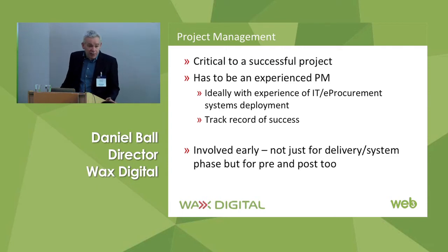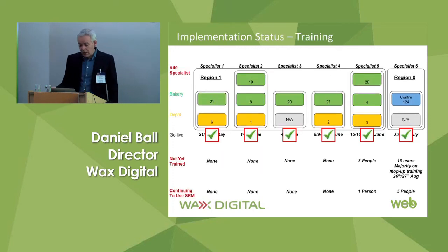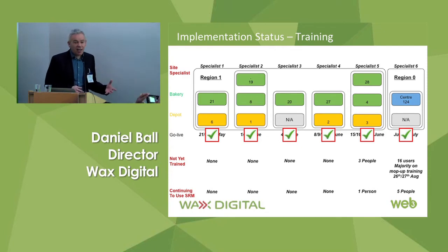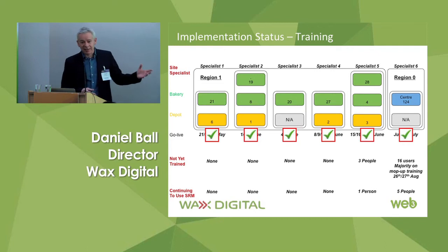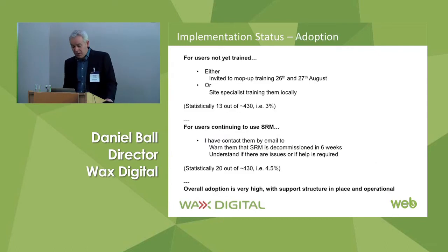Ideally with experience of an e-procurement implementation, and to engage with them on the project a couple of months before you start and actually keep them on that project a couple of months after implementation is complete. Because even once the system is live, you want somebody to manage the deployment with military precision, really, who can tell you exactly how many people have been trained at each site in a 13-site nationwide deployment, as here for one of our clients, for example. And who can tell you how many are left to be mopped up to account for absence or illness and so forth, and what the actual plan is to mop up those remaining users.